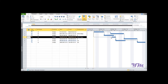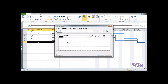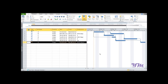Now say Activity G has a Finish-to-Start relationship with Activity E with a lag of two days. Double-click on Activity G's predecessor field — here you have two options: Activity 5 (E) and Activity 6 (F). Set the lag of two days for Activity E. You don't need to change the lag for F since it already has a Finish-to-Start relationship with zero lag. Press OK.